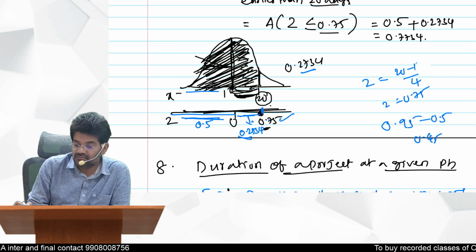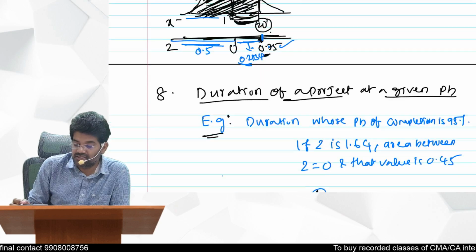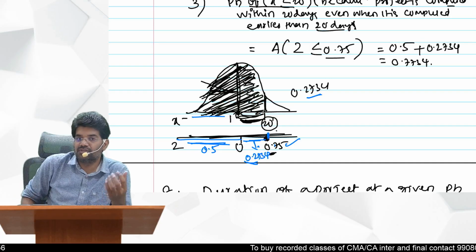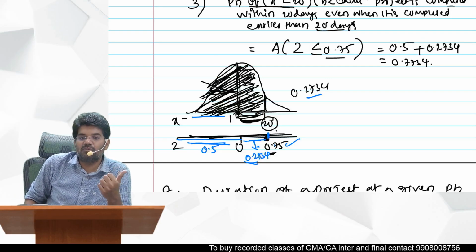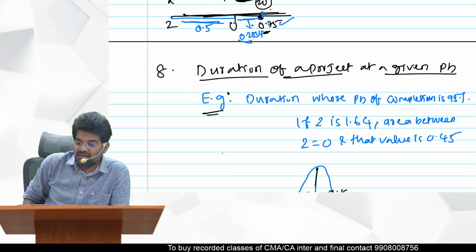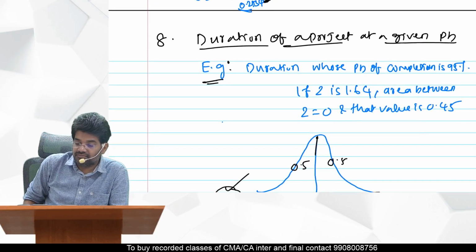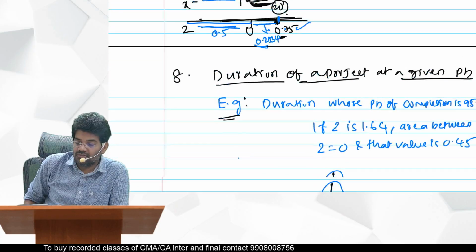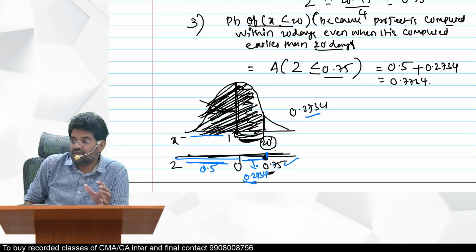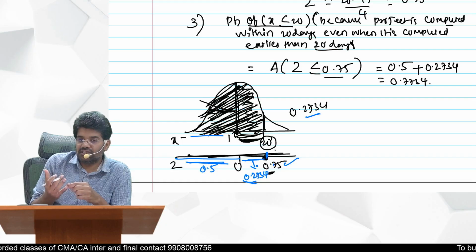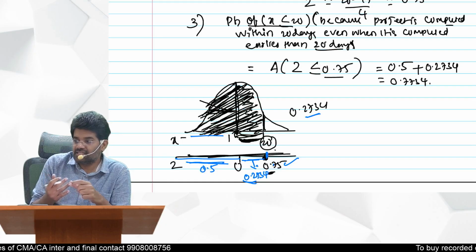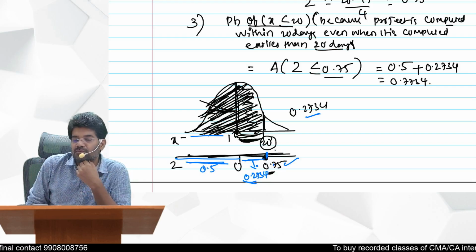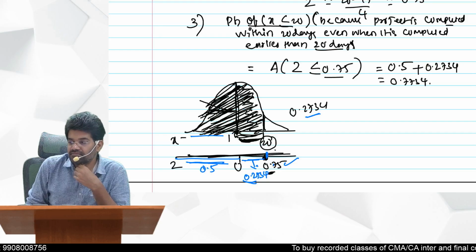Now next, we are assuming that 0.2734 is from which table? That is the standard normal table. So that is how we should first calculate the project duration, then standard deviation, then you can calculate the probability of completion of your project within a particular time frame.